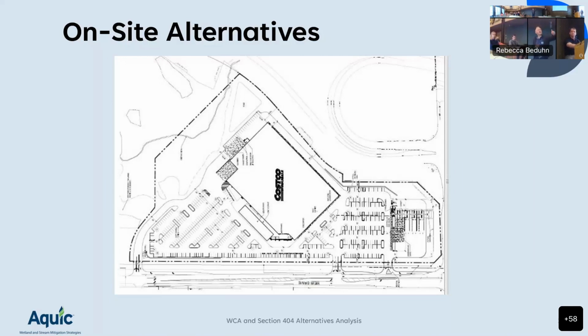They also were gonna have, there's a gas station too, right? But then they also are gonna need in the back of the store for the deliveries, they know that they would need certain radius for trucks to turn, and they had different spatial requirements, standards that they had to meet in the back of the store as well, that were defining, were constraining their project. So for those reasons, this avoidance alternative was crossed out. They were able to defend that though.